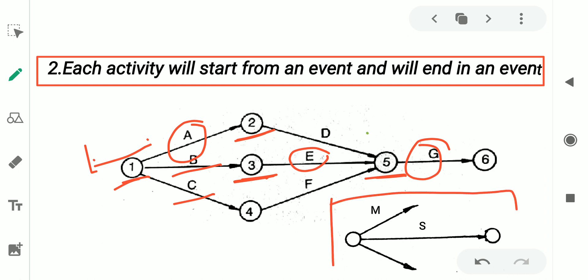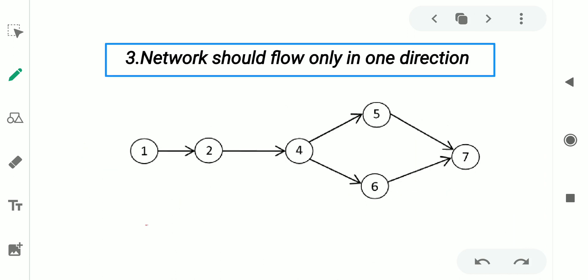However, if you consider this other project network, you may observe that activity M has started from an event but has not ended in any other event. So this particular project network is incorrect.